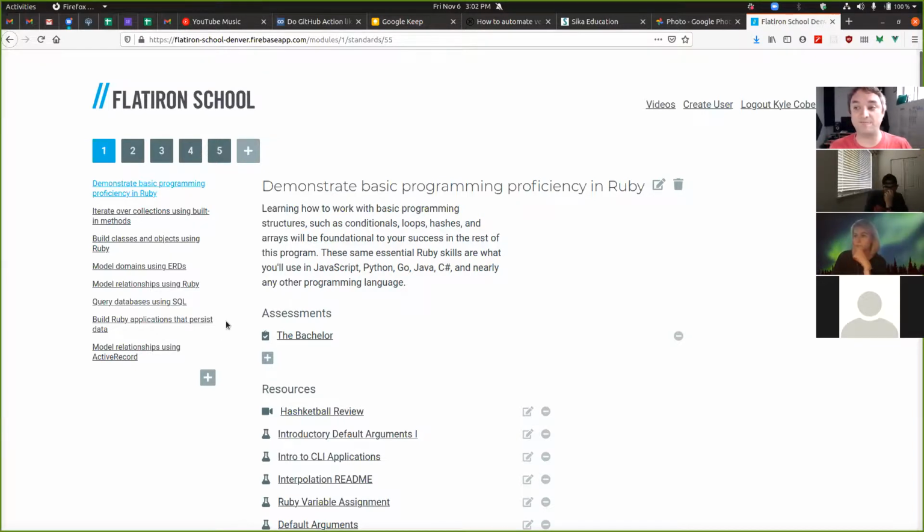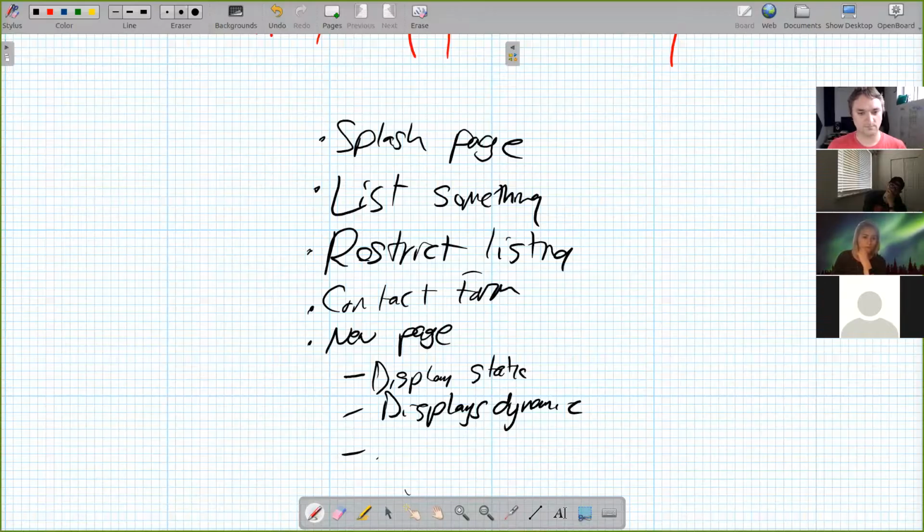And I can make that feature smaller by finding another complete way to do it that doesn't have the cool interaction. So now you've split that into 2 different features, which makes them a lot thinner, which makes them a lot easier to do. Ultimately, you're trying to do something useful for a user every single time, but the smallest version of that you can.